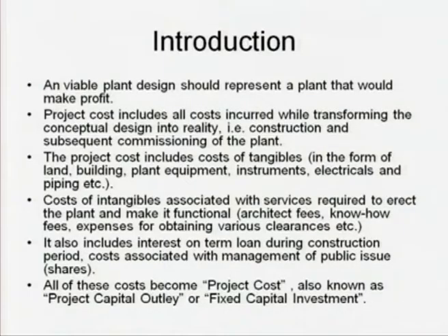In addition, we also have to consider the interest on the term loan during construction period. If capital is borrowed from a bank, or if the money is borrowed in the form of shares, then there is the cost associated with management of the public issue. So all of these costs become the project cost, also known as the project capital outlay or capital investment in short.